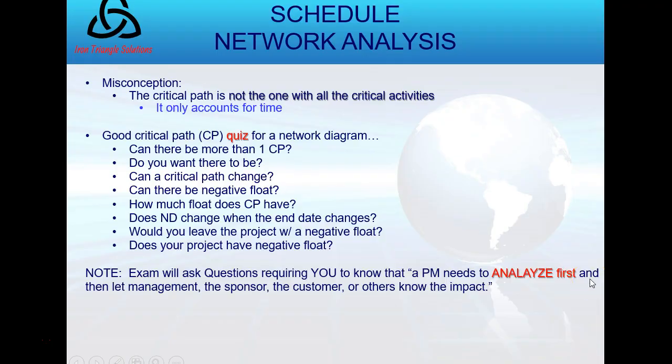Okay, let's wrap up schedule management in these final 6 minutes. So, the schedule network analysis. There's a misconception out there that the critical path is the one with all the critical activities. No. Realize that the critical path is not the path with the critical activities. I could have one or two critical activities elsewhere, but the critical path only accounts for time. It's about time management in this schedule management knowledge area.